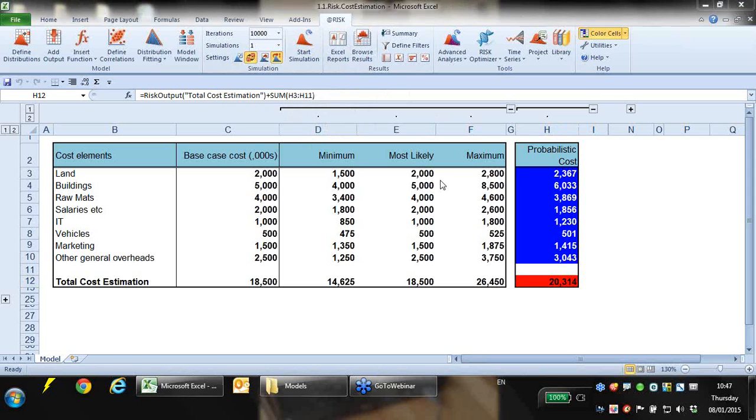Someone else then asked for any input on the number of iterations which works best. Lots of people think that the maximum number of iterations you can have in here is 10,000 because you've only got this pre-built limit of 10,000 here, but actually this is a free number field. So if you wanted to give 100,000 iterations or 2,501 iterations, you can type that in.